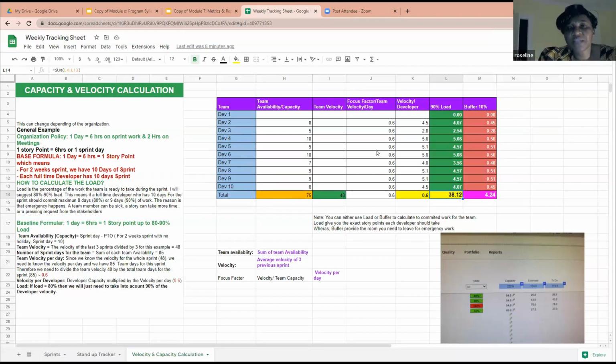The team level agreement could be like a backup plan. But it's not just backup. You agree on the way you are going to work as a team, on every area. When it comes to sharing tools, how do we agree? How do we even consider a story done? Even the definition of done is part of the team working agreement, because they have to agree at what point we do the documentation.